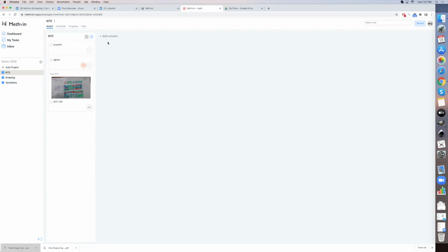Another thing that can be used really well is you have all your sites across the top and all your plant and equipment in each task. For each task, let's say for your grader, your D6, you'll have all these tasks, and depending on which site they are, you just move them across, and where you plan to move them, you just communicate that in the comments side. Very handy for that type of thing, for servicing equipment and all the rest.